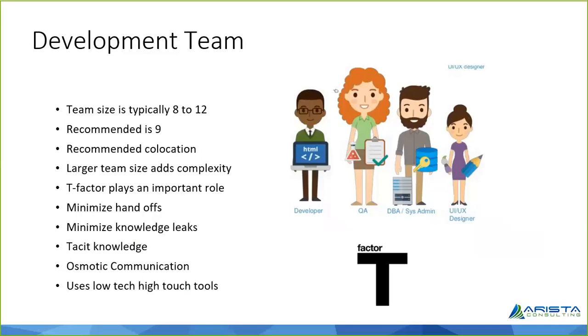Normally there is no larger team size, because larger team size adds complexity. Even if we are virtually co-located, the team size is between 9 to 12. It should not exceed that. T factor, I'll come to it a bit later.